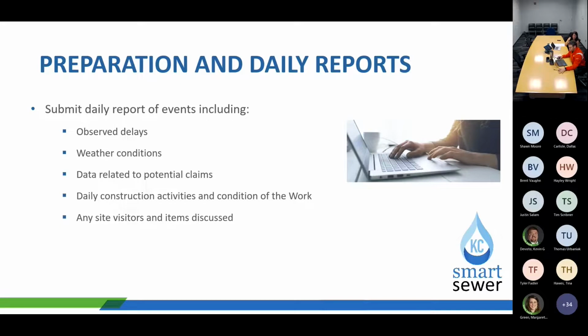Contractor can continue working. If there were a weather condition at 2 o'clock in the afternoon and it thunderstormed and rained, okay, contractor left for the day because the weather conditions weren't suitable for work, or the contractor couldn't continue due to the weather.